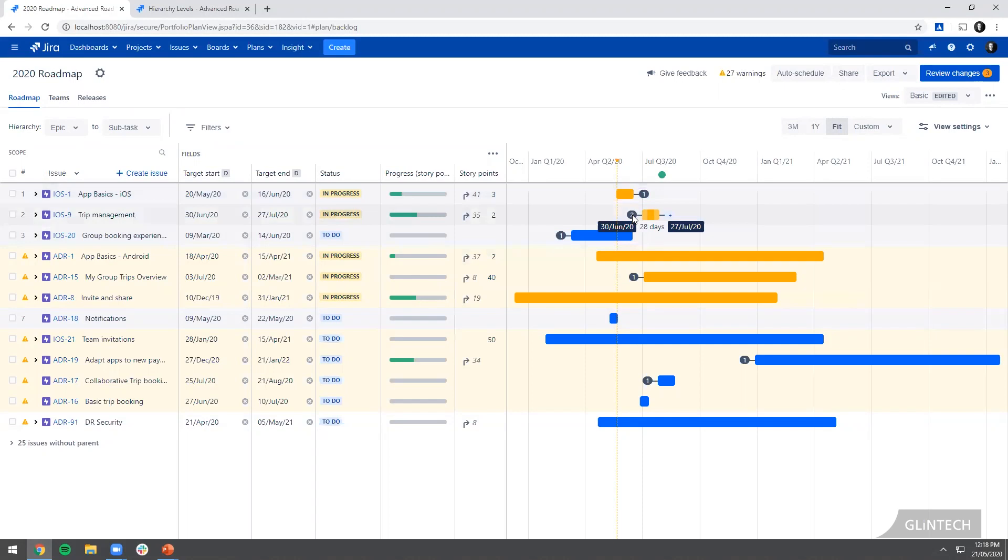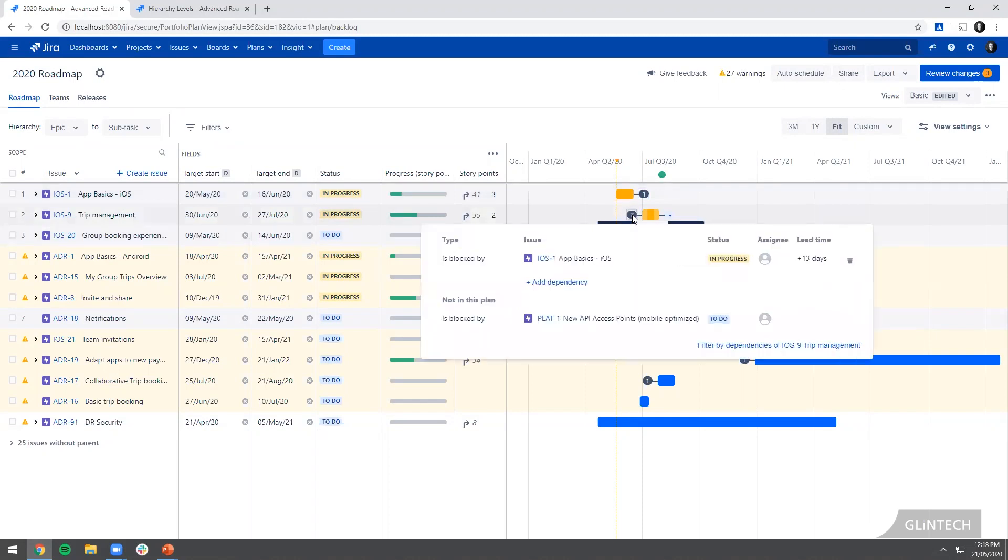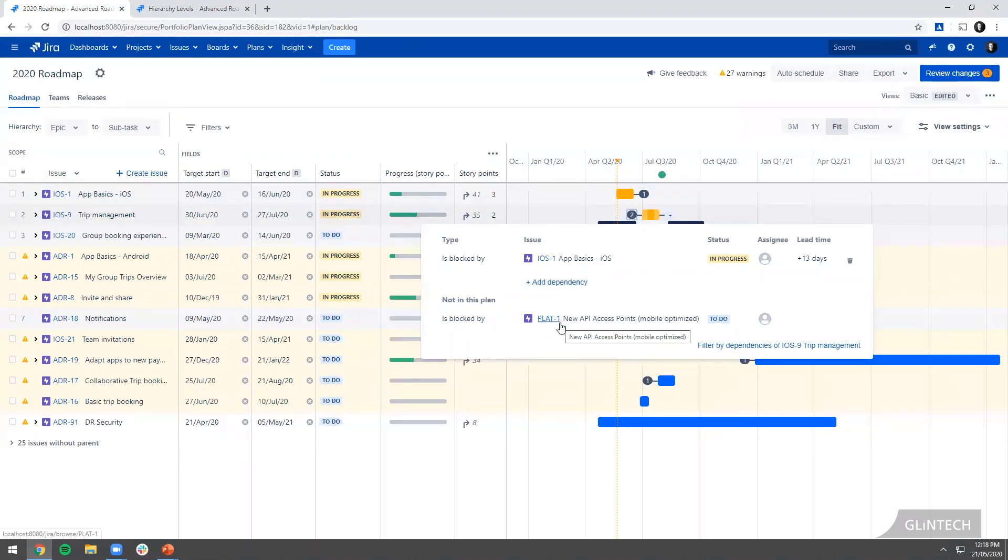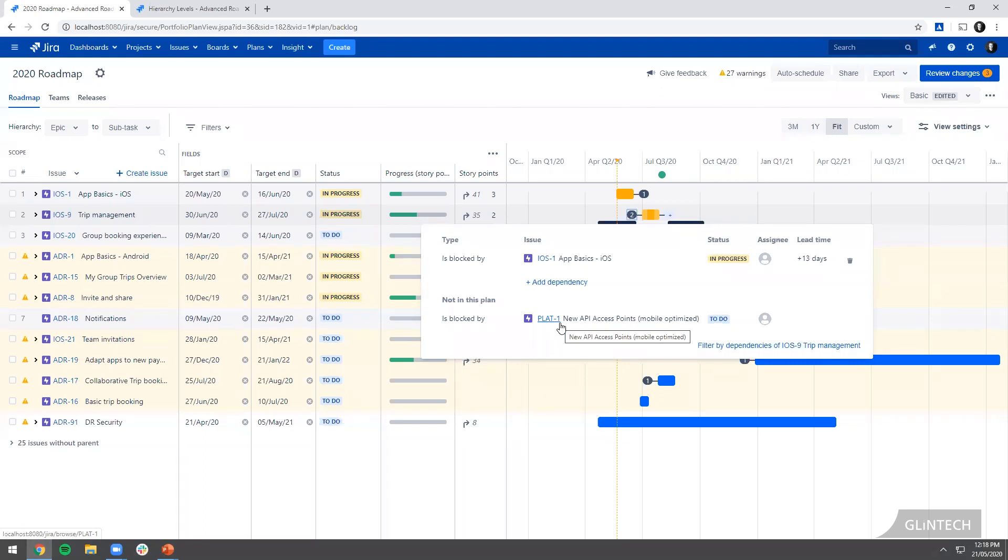Now you'll see that's got a 2 in it. That's because it's been blocked by this one above it that we know about. It's also telling me it's been blocked by another piece of work that's not in this plan. And that's new to version 3 of Portfolio. It used to be in Portfolio version 2 that you could only see dependencies from the work that was in your plan. Now we get a much truer view. I can actually see this other work outside this plan that could bear some influence into when this piece of work can start.